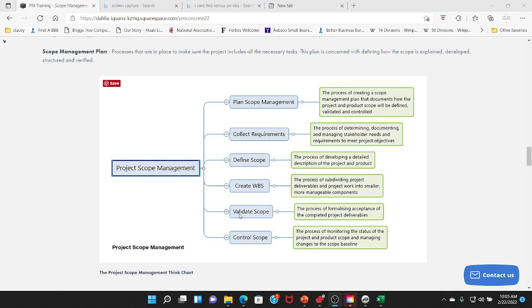And now I'm specifically talking about building the building, but there's an amount of time it is going to take also to write up the contracts for all of the contractors. So that is part of this. There's the amount of time it takes to order all of the material if you have a national supplier. That's part of this.